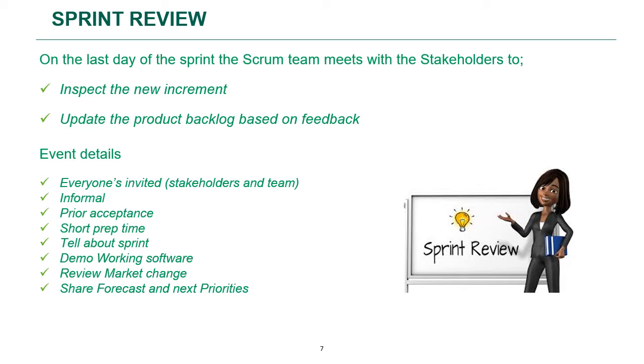The development team will discuss if it has run into any problems and how those problems have been solved. Right? They give a demo of the working software, and based upon any feedback provided on that demo, the product backlog is updated, and there is also a review of your timeline, budget, and the priorities for your upcoming functionalities.